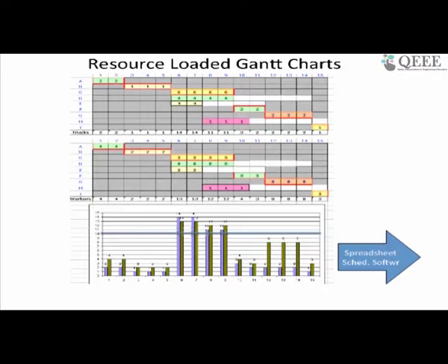Remember, in the earlier case we were working with a single resource, so we could move around and just talk about one graph. Here, as we move things, I can't just move this. If I move these 4s to the side, these 8s will also move with them. If I move the 4 trucks, the 8 workers will also move here, which means this might get overloaded with work.